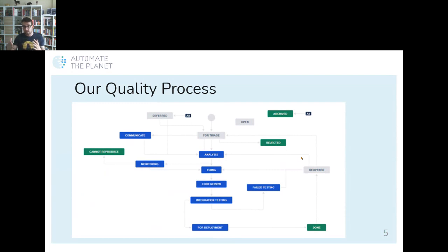It is not called fixing immediately because we still don't know whether the observation is a bug or not. The developer analyzes it, fills in some data such as root cause, and probably provides an estimation of how much it will cost to be fixed. On the next day, having in mind the velocity of the team, the planning, and the urgency of the fix, we plan how to proceed, whether we should fix it in this sprint or plan it for the next. During the testing and analysis phases, we fill in most of the data that I'm going to discuss a little bit later, and based on this data, we calculate the quality metrics. The most important part is that each month we get together as a team and check the metrics to see what the trends are, analyze them, and see how we can improve the process if needed.